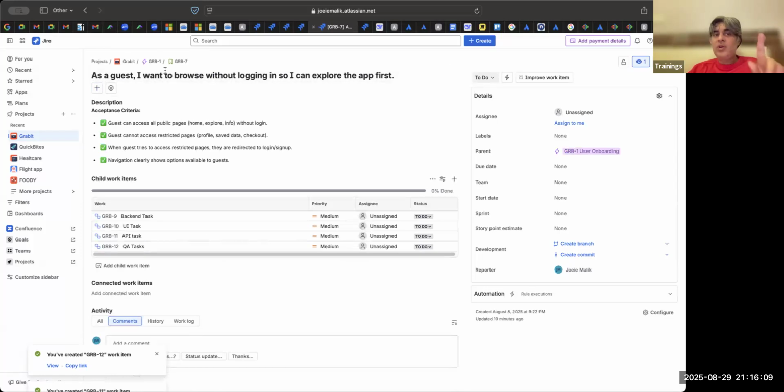In this case, the workflow is Epic. Epic is divided into story, then story is divided into subtasks. If I want further demarcation, that is possible. So in this case, QA says, I don't want one task, I want three tasks: test execution, test case design, and test data creation. Somebody says, but this is a very simple story. He says, okay, I'll live with it, I'll create all these three things within that task. But if it is a complicated story, I can have three tasks for my QA. Similarly, for backend, if there are multiple tasks, you can create those multiple tasks also.